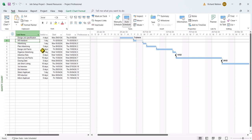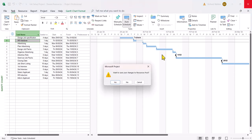We've got another project with the same starting date, and I'll assign Trainers to that project at the same time — then there'll be a conflict. So I'm going to save this one now, close down this project plus the resource pool, and say yes to that.